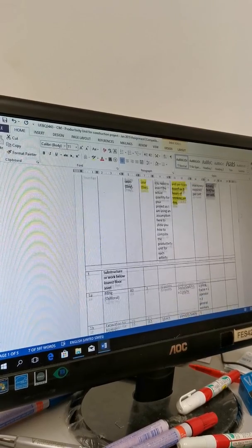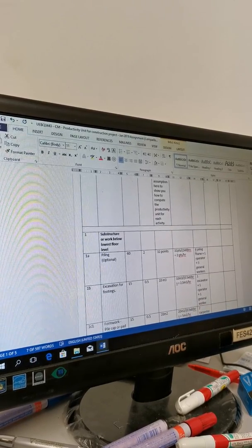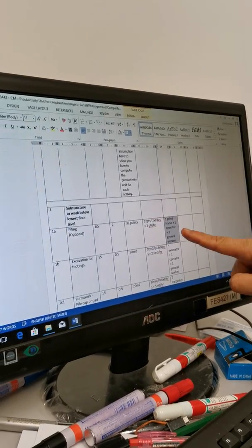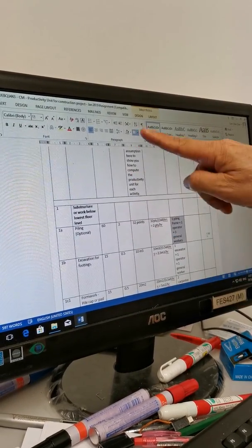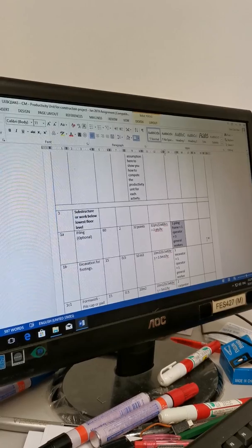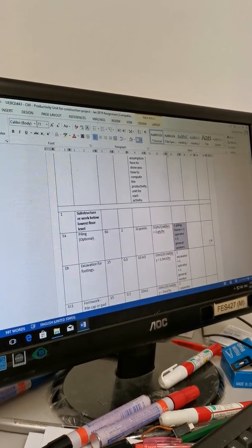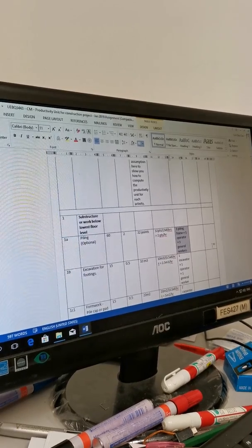Example here: one piling frame, because it so happened that this project has piling. One unit, you need one piling frame. If there are 30 units, you put 30 piling frames there. You'd say you're mad. Are you clear? So this one is just for a single unit exercise. These are the things required.